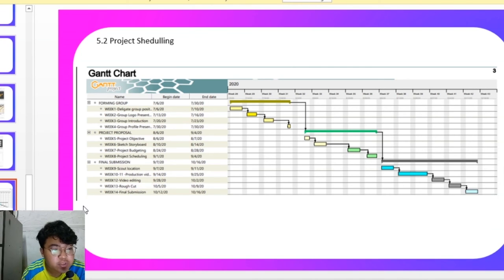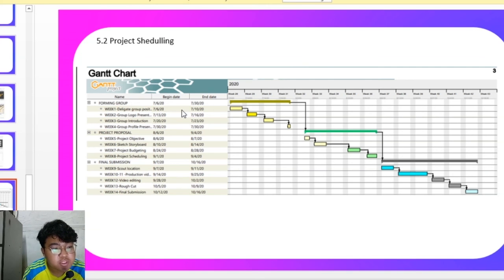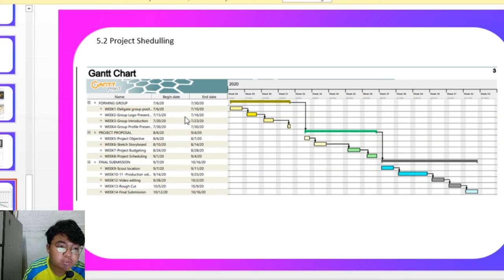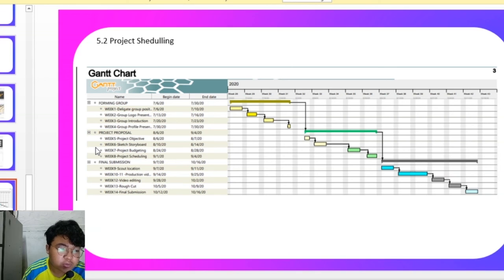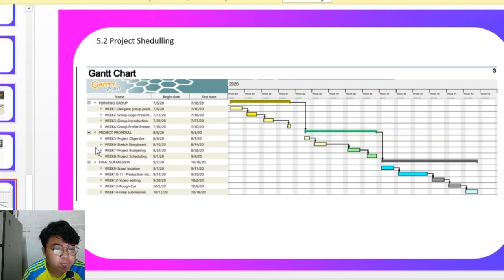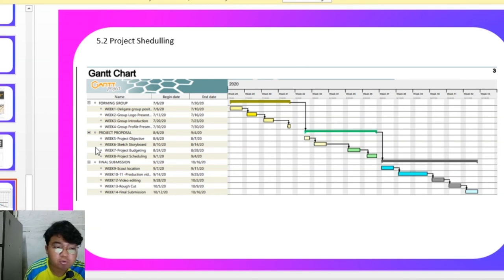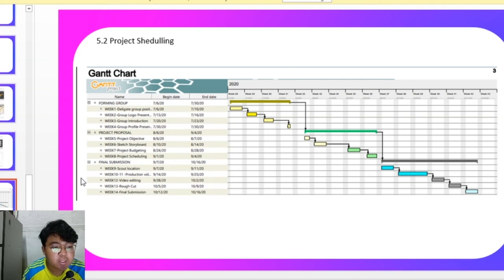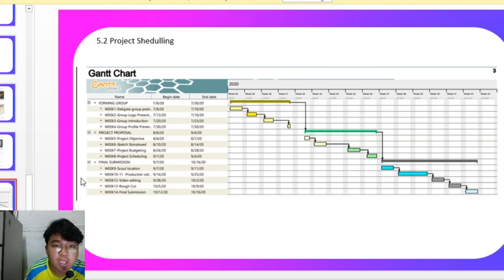Lastly, this is our project scheduling. First, we are forming a group, delegate the presentation. And we are going to present our group logos and group introduction, also group profile presentation. We are going to start our project proposal week 5, which is finding a project objective, sketch a storyboard, project budgeting and also scheduling. For final submission at week 9, we are going to scout the location, product listing, video editing, get a rough cut and final submission at week 14.